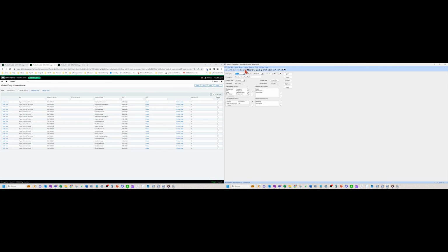There's also something called a markup table and an add-on table. Okay. It's kind of hard to remember the difference between all of these. So I'm going to show you and compare this over to the Intacct rate tables here in a second. Okay. So this would be if you want to mark up labor at a flat dollar amount per hour. That's a rate table. Or maybe you have unit pricing on your material, for example.